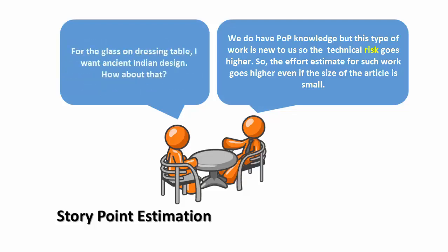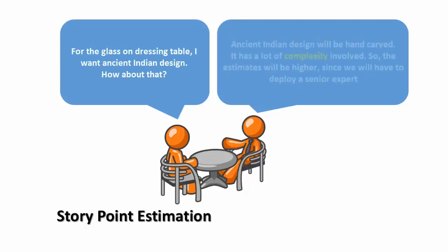For the glass on the dressing table, I want ancient Indian design. How about that? Ancient Indian design will be hand carved. It has a lot of complexity involved. So the estimate will be higher since we will have to deploy a senior expert here.